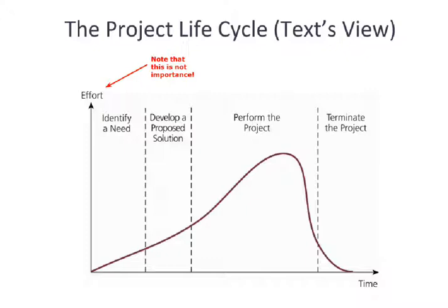The early stages, identification of the project needs and development of the proposed solution, are critical because they set the path for the entire project. So even though the graph is lower in those early regions, that does not mean those regions are less important. In fact, in many ways, they're more important. This is simply demonstrating effort, or maybe the amount of energy that's put into that particular stage. Obviously, the middle stage, performance of the project, represents the lion's share of the energy or effort on the project, but not the lion's share of the importance.